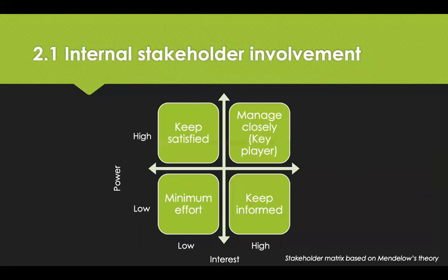You can use the Mendelow's matrix to identify how to engage with each group of stakeholders depending on their relevant power or interest. Stakeholder power is the ability to influence events, and interest is the impact of the decision that it's going to have on them.